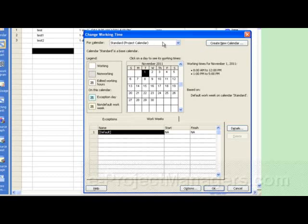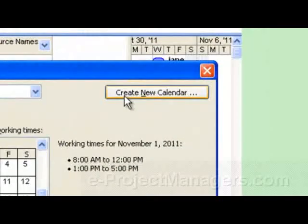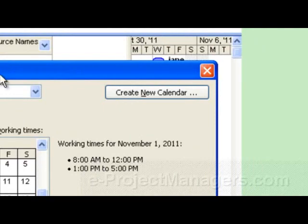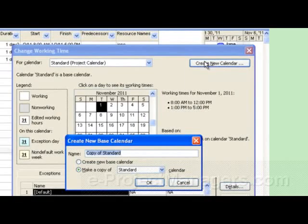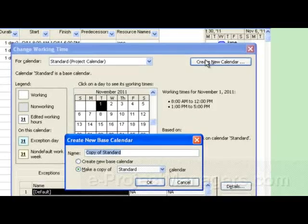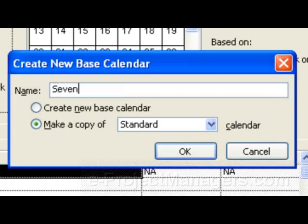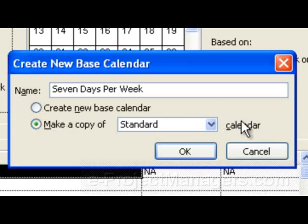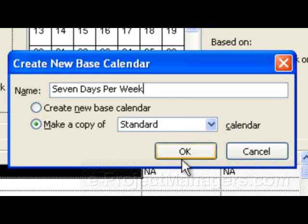But let's say you want to keep your default calendar and only assign a 7-day workweek to specific resources. You can do that by creating a new calendar. Come into the Change Working Time dialog box, click on Create New Calendar, and name the calendar — I would name it something memorable like '7 Days Per Week.' You can make a copy of your standard calendar to create this, or create a new base calendar from scratch. If you've already put company holidays in your standard calendar, you might want to use that as the base.